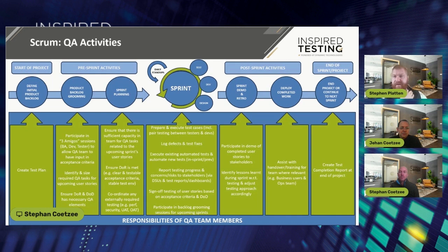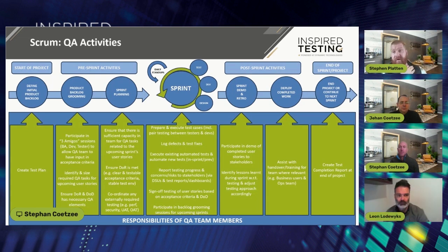Some good practices include making sure you don't have non-allocated defects. I've seen it where you'd have a defect on the board that wasn't associated with a user story, just floating around somewhere in the ether, or sitting in the backlog, not allocated. Make sure that your defects, when raised, are associated with something else in the sprint. Otherwise, they're going to get ignored and left.